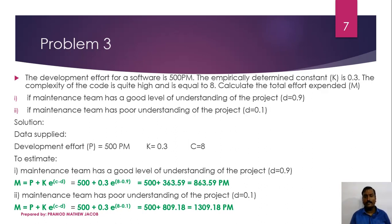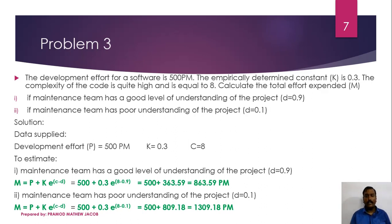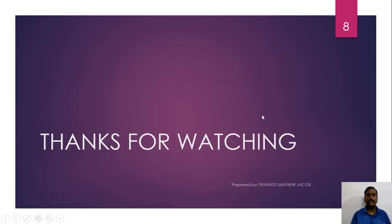For the second case, the maintenance team has poor understanding of the project, so D equals 0.1. Substituting: M equals 500 plus 0.3 into e raised to (8 minus 0.1), which equals 500 plus 0.3 into e raised to 7.9, which equals 500 plus 809.19, giving a total of 1309.19 person months. Here we can notice that the effort and the maintenance cost increases drastically if the maintenance team has poor understanding about the project being maintained.